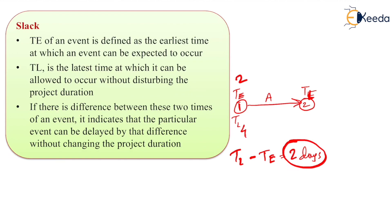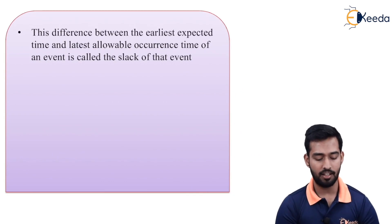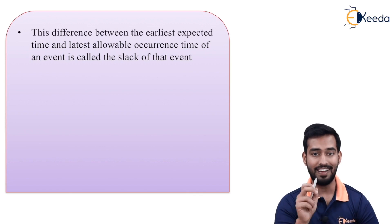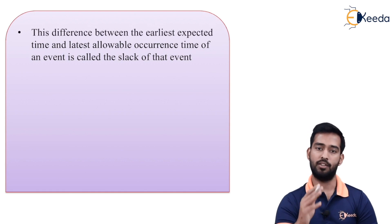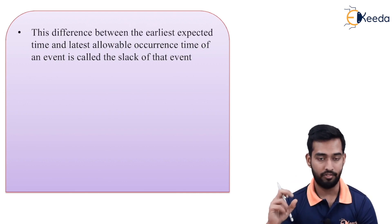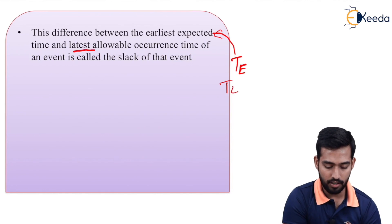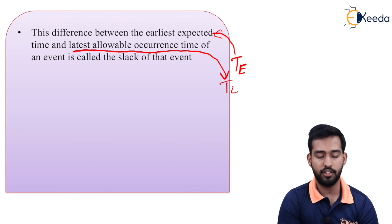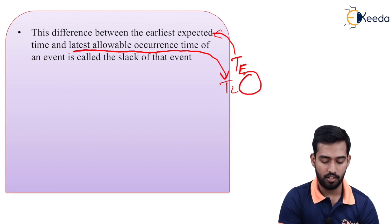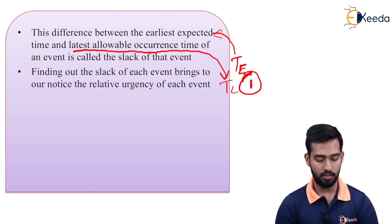This difference of two days exists within the project without disturbing the complete project duration — that is your slack. The difference between the earliest expected time Te and the latest allowable occurrence time TL of an event is called the slack of that particular event. So for each event, slack is different. Te is your earliest expected time and TL is your latest allowable occurrence time, and the difference between these two times for a particular event is its slack.